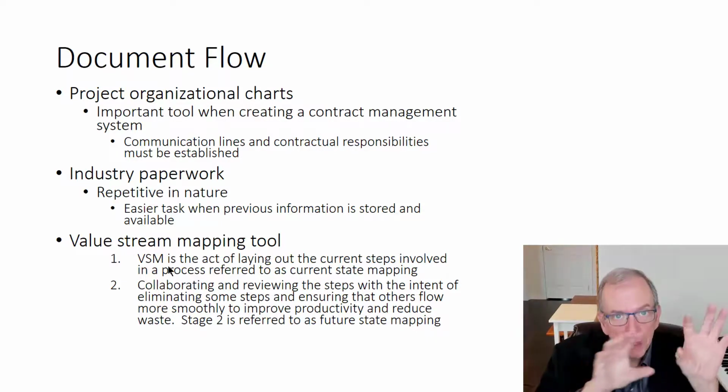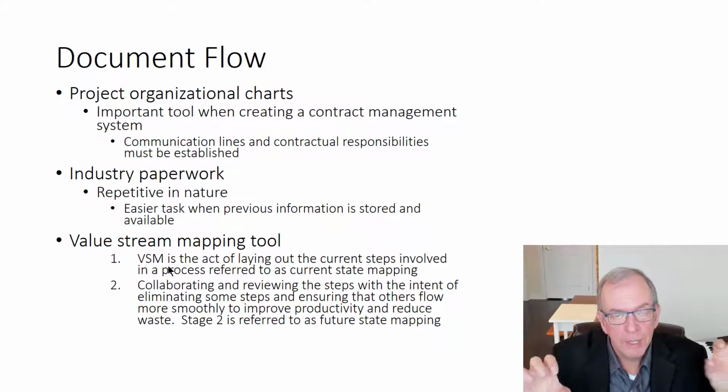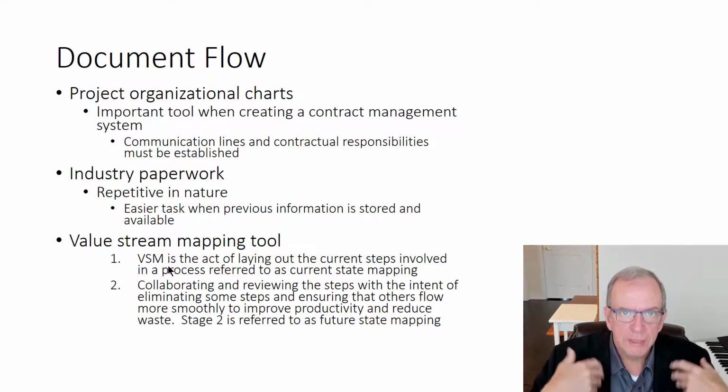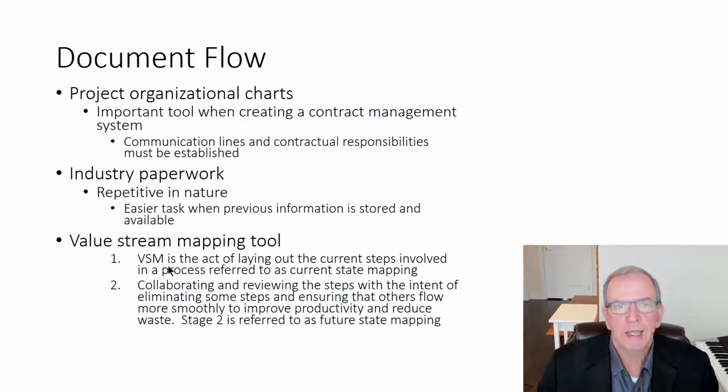And of course, if you have everybody that's involved in the value stream, they have their own ideas about what slows them down. And then you can really dig deep into those areas and look at possible remedies. In some of the examples, they've literally shortened the process by months in being able to get a change order through and get payment out to the contractor. In the one example, I think it was taking about 4 or 5 months for the contractor to actually get the change order approved and paid. And they got that down to something like 90 days. So instead of taking 4 or 5 months, you got it down to 3 months.